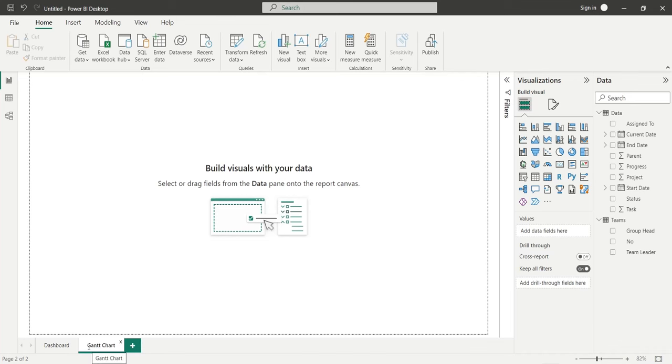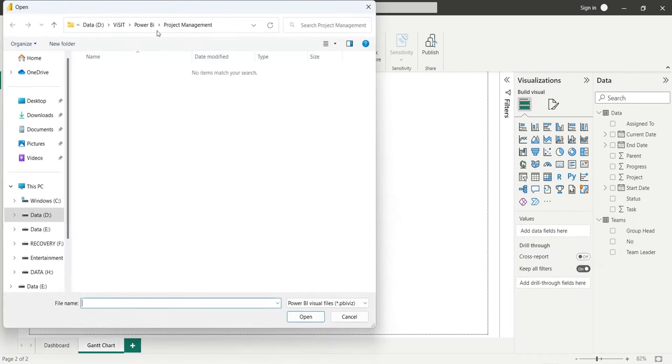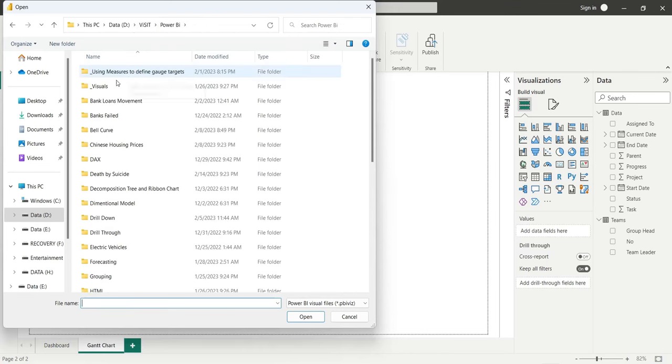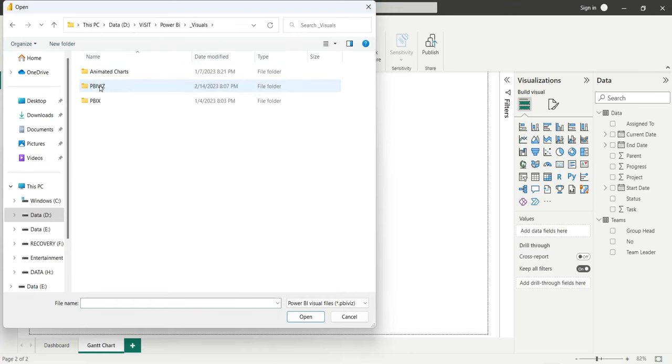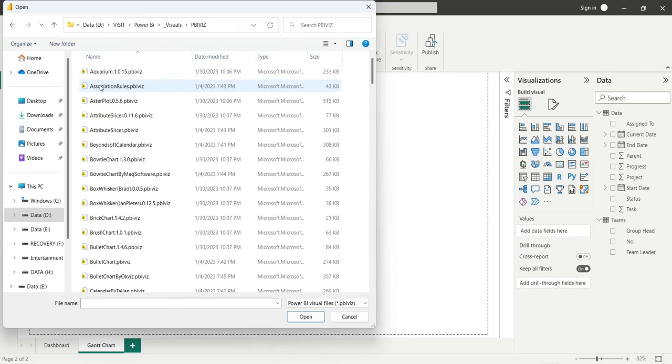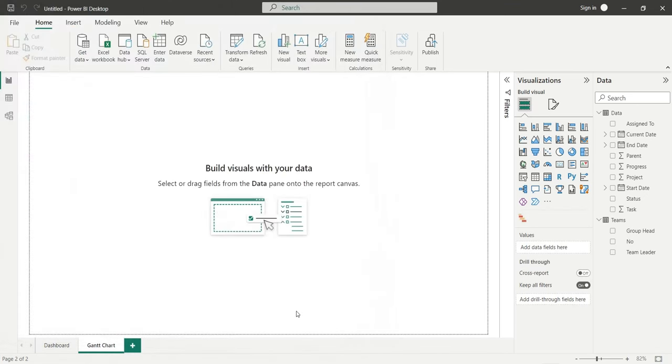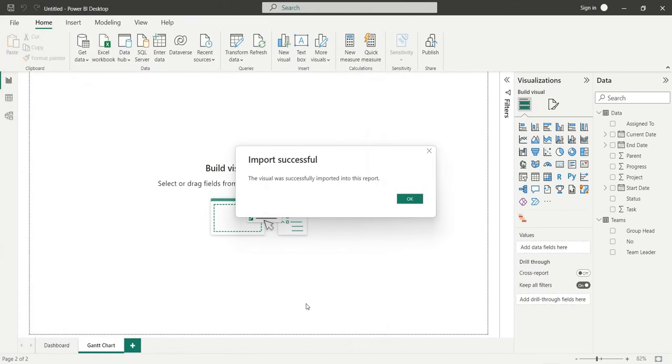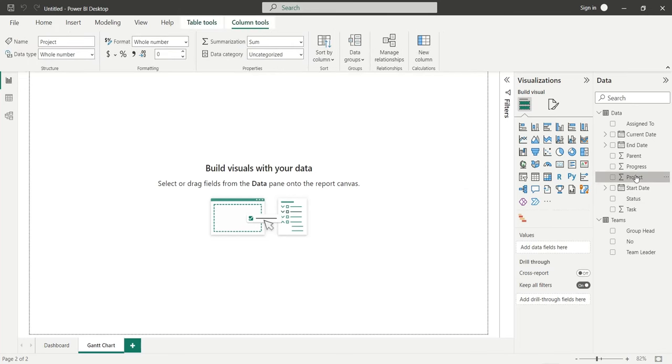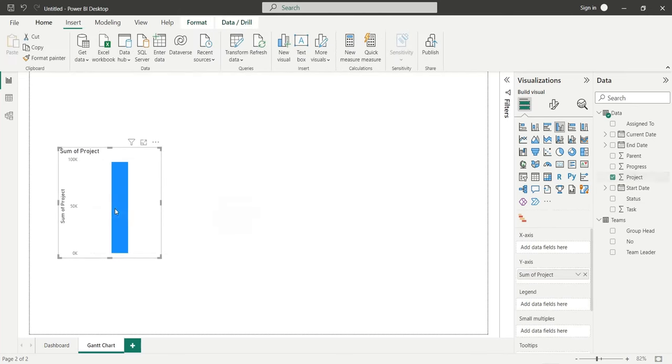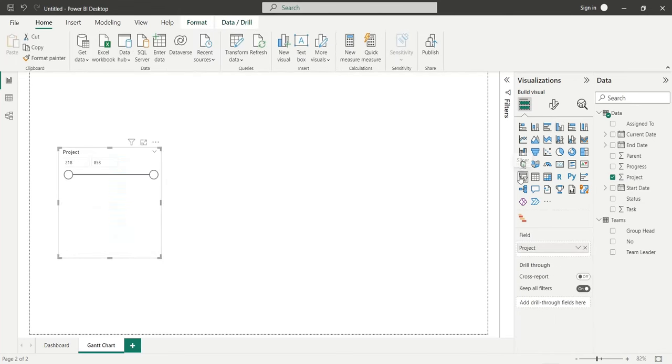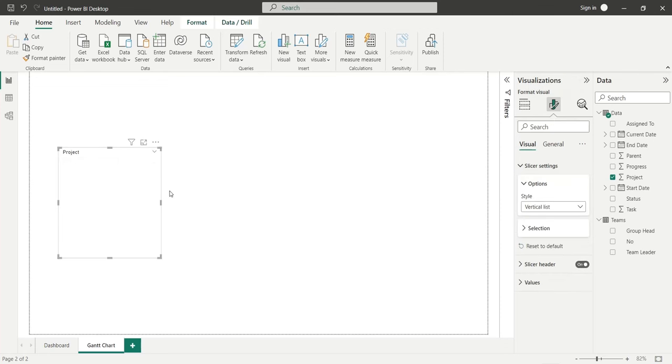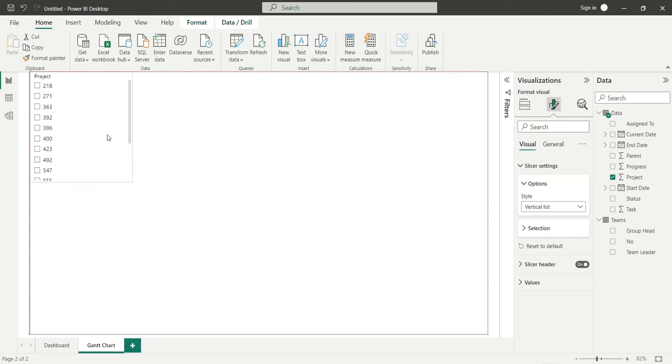To create a Gantt chart, we need to import a custom visual. We have it saved on our hard drive, but you can get one from the online store as well. Insert the project field to the dashboard and change the visual to a slicer. Change the slicer type to a vertical list. Place the slicer at the left side of the dashboard.